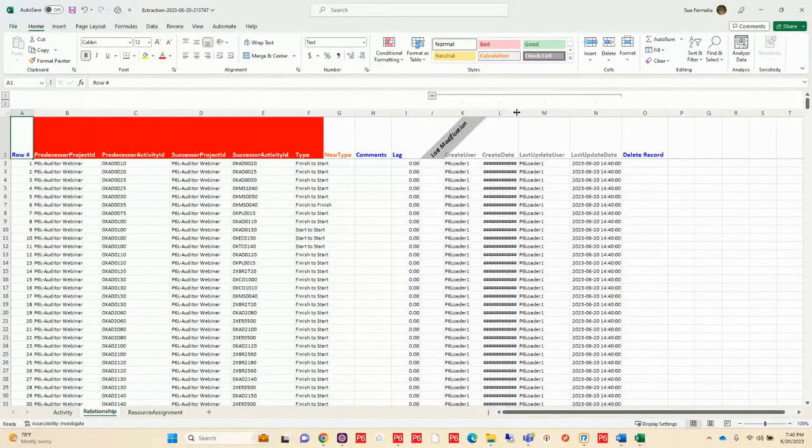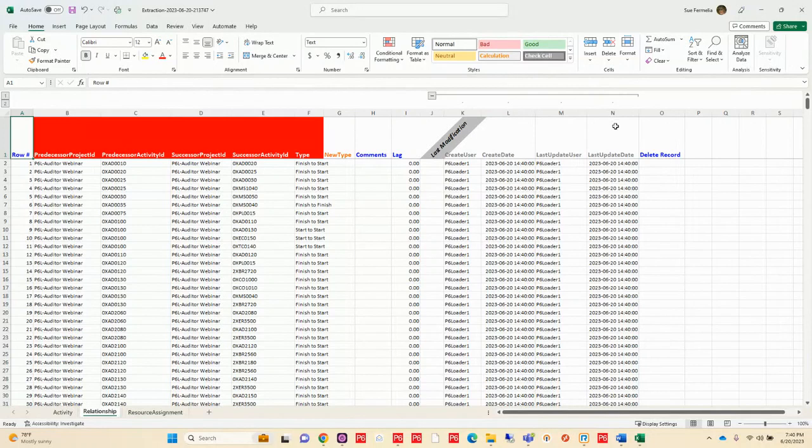But yeah, this last modification date is going to allow you to find out what happened since that deletion occurred. Okay, good. So you wouldn't have to necessarily start all over again. No, actually, the activities that got missed or deleted, or were added, I should say, since the backup. And then you load in the logic, and then you could load in other things too, I guess, if they're missing. Yeah, whatever you may have missed.